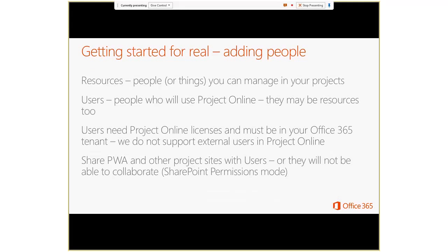You might have an executive who needs access to be able to review some of the project plans, who may not actually be anybody that ever does any work, because obviously executives don't. So you don't need to assign him. He doesn't need to be a resource, as he doesn't do any work on your project plans. That's really the differentiation between the resources and users.